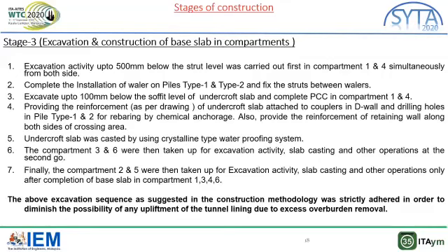Finally, the compartment 2 and 5 were taken up for excavation activity, slab casting and other operations only after completion of base slab in compartment 1, 3, 4 and 6. The above excavation sequence as suggested in construction methodology was strictly adhered to in order to diminish the possibility of any upliftment of the tunnel lining due to excess overburden removal.